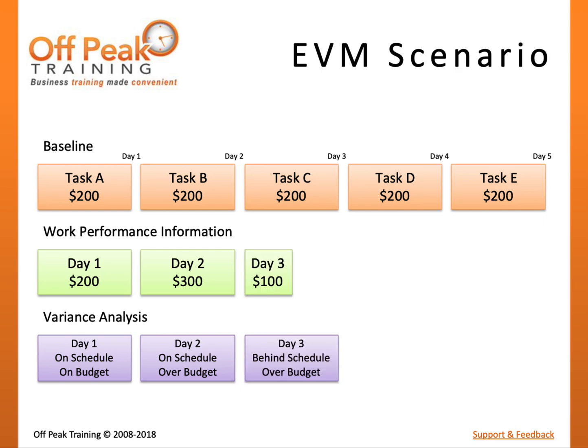On Day 3, you only complete half of Task C and have spent another $100. At this point, we are behind schedule because we should be done with Task C. Additionally, we have spent $600 but have only accomplished $500 worth of work. It seems we are behind schedule and over budget.